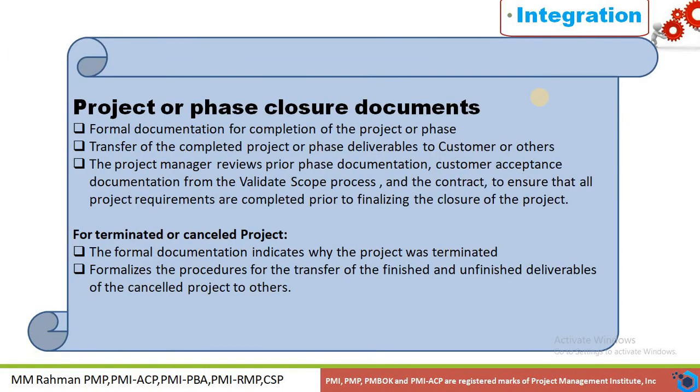Then the project or phase closure documents, the formal documentation for completion of the project or phase. That should be formal documentation where we complete the project. That should be signed off. We will get a sign off from the customer or our stakeholders. Then transfer the completed project or phase deliverables to the customer or other stakeholders.